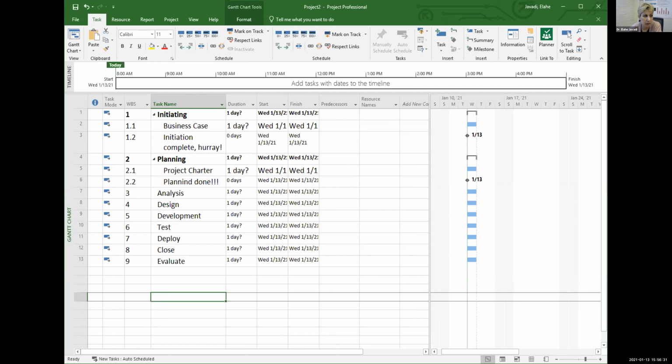Next thing I want to do, and it's written on your lab guide, is that we want to have a general modified waterfall approach, meaning that the phases happen one after the other, but they can overlap. So I'm going to click on major phases, not on deliverables yet, major phases. And then specify dependencies. You can follow me or you can do your own version because it doesn't have to look exactly like mine.